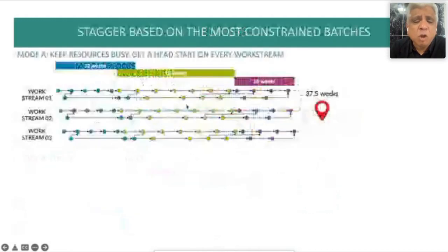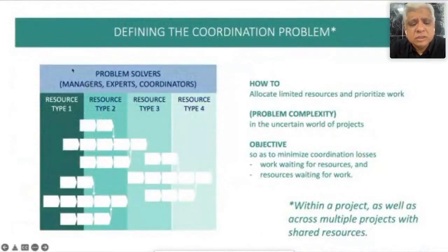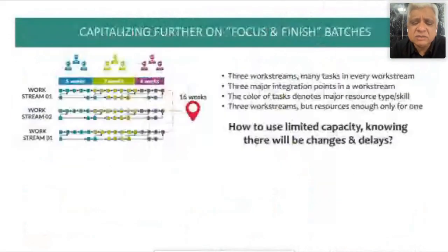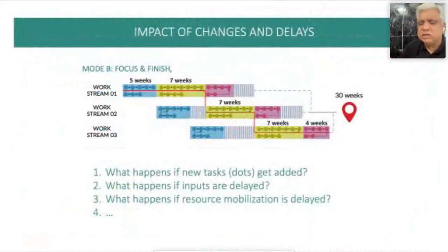It also solves this problem of level of effort resources. Which problem should a manager solve? Which problem should the expert go and solve? What should we expedite first? Again, the answer is in buffers. Wherever you have more buffer remaining, that assumes a lower priority. Wherever you have less buffer remaining, that gets the highest priority.